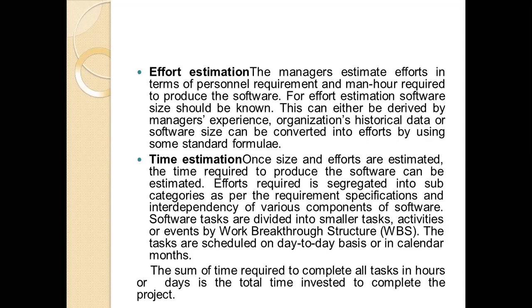The next phase is time estimation. The time required to produce the software can be easily estimated if you have estimated the size and effort. Effort required is segregated into subcategories as per the requirement specification and interdependency of various components of software. Software tasks are divided into smaller tasks, activities, or events, or what we call a work breakdown structure. If we have a particular kind of software,